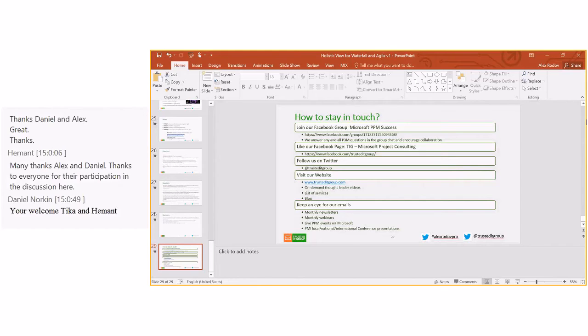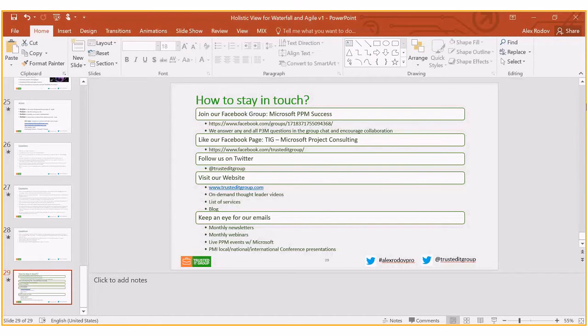And then for those teams, you would likely know your velocities, which is how many stories you can turn around within the sprint. That would give you the overall number of story points that you have according to your budget. So your budget would sometimes actually equal a certain number of story points, which you would split up between your teams and between your sprints.